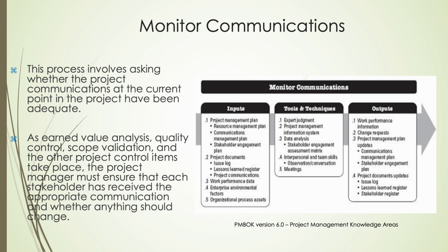The outputs of monitoring communications include work performance information, change requests, and updates to the communications management plan and stakeholder engagement plan. Regularly monitoring communications helps identify gaps or misunderstandings early, allowing corrective actions to be taken promptly. Effective communication monitoring not only improves project performance but also builds stronger relationships with stakeholders through increased transparency and responsiveness.